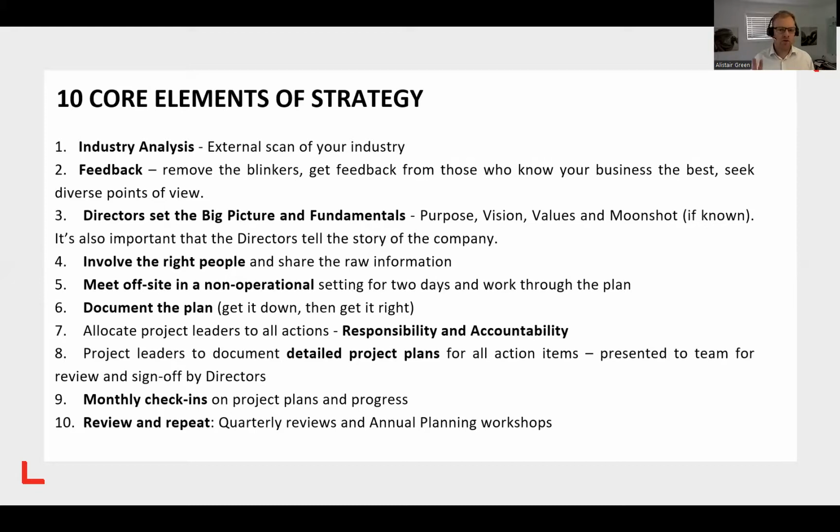I give our team 2 weeks, but I'd say no longer than 2 weeks. Somewhere 1 to 2 weeks is plenty of time for them to have a first draft of their project plan and then come back to a management meeting or a team meeting to present them to the team for review and then for director sign off. Now you're signing off saying, yep, you've captured exactly what I want delivered, and you've got some action steps there. So careful with rubber stamping things that come through. Make sure that you ask the questions when needed.